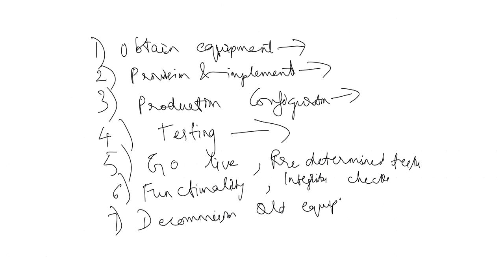Tons of tasks that you need to make sure of. You have to erase your software, deinstall anything that you have done, and erase your content. And again, that might take 2 or 3 days, right? So you see that for each phase, you have to see how many days it's going to take, depending on the stage, velocity, and number of people you have.